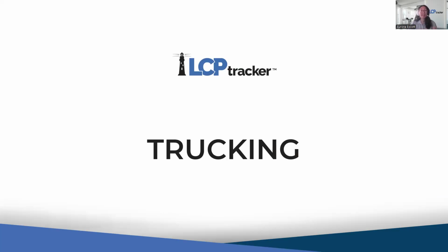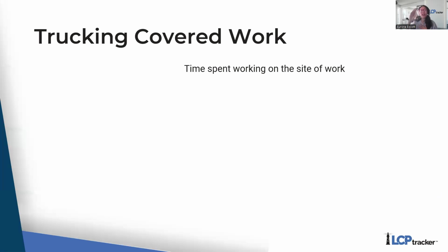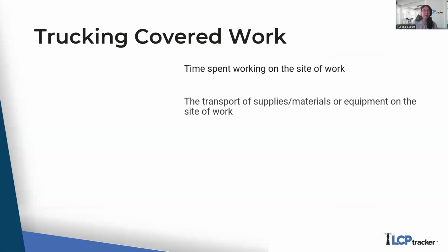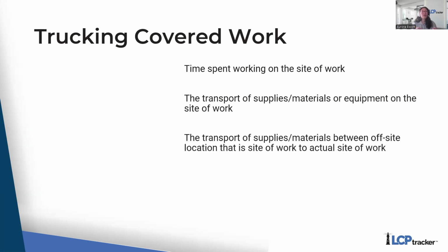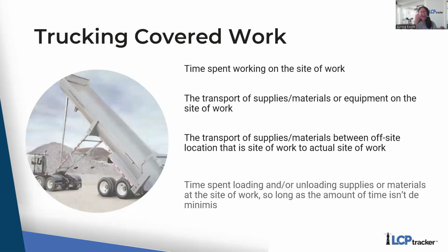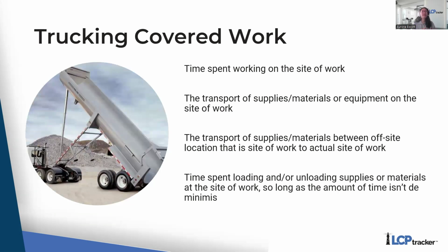So this was my daddy's bread and butter, as I had mentioned earlier. The final rules of 2023 also made some changes here, but because of the litigation that's happening right now, it's business as usual. So we're going to talk business as usual for trucking. Trucking is covered for any time spent working on the site of work, for the transportation of supplies and materials on that site of work, for the transportation between offsite locations and the actual site of work, and for time spent loading or unloading supplies, so long as the amount of time isn't de minimis.